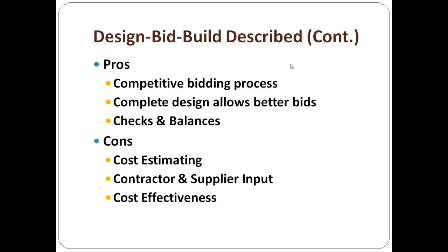That's 70 to 71% by the research that's been done of the overall cost of a building: the life cycle, the maintenance and repair and renovation and the insurance and the custodial and on you go of the building. The finance charge for borrowing money to build and the cost of building the building, including the design and construction fees that your industry professionals are paid, is a small slice of the pie. And so if you're not looking at the life cycle cost and how well something you're building is going to last, there's a concern.